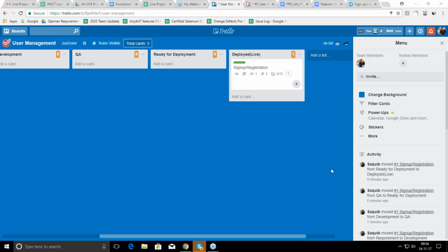The next question is, will each member on the same team be given a different task? Yes. So Maria, we have a long list of requirements, so each person is going to work on individual tasks. If the requirement for a particular backlog item is a big one, then two persons can work on it. Based on the effort, we can assign the task to the members. If it is a simple requirement, then one can handle it. If it is complex, then two or maybe three members can work on it.